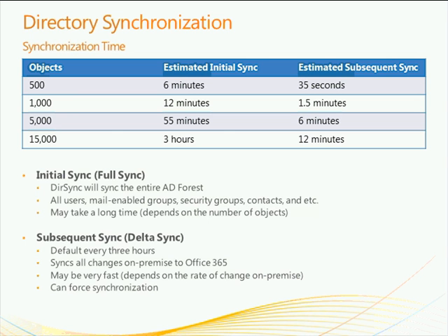However, something to keep in mind. So if you're looking at about 15,000 users, it might take 3 hours for that initial sync. If you're looking at 100,000 users, it might take 12 hours, 16 hours more. That initial sync in some cases can take a very long time, and it really depends on the size of your organization and some various other factors.